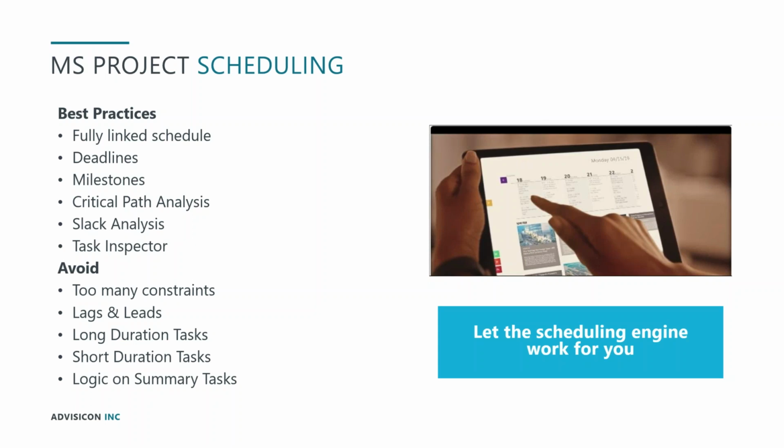We want to use milestones in our project schedule to signify the completion of a particular deliverable or a phase. It's helpful in working with that project schedule if those milestones are widely recognized by your stakeholders. So think of the way that you want to talk about your project progress in terms of how you're doing at aiming towards that particular milestone, whether it's a deliverable or it's a stage gate, an approval step that you're going through in the project. You want to be thinking of your various tasks as contributing to the completion of or readiness for that milestone.